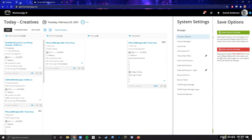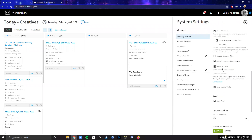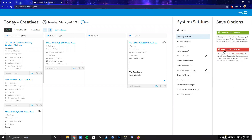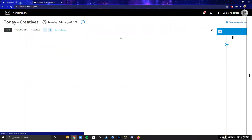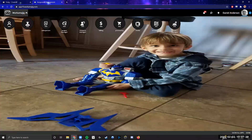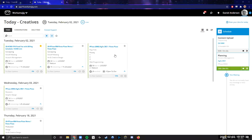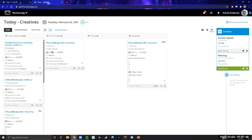One of the things you lose if you don't use the tile view: the card view doesn't show any of those task status columns at all. The card view page does not care if you've moved something into 'Do This Today' or 'Priority' — it's an entirely separate way of managing tasks. That's one of the main reasons I often mandate the tile view. If your project managers are heavily utilizing the column sets in the assignment management page, you typically want to drive your team toward the tile view.